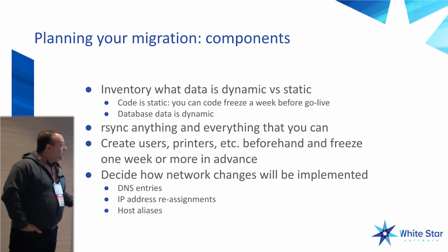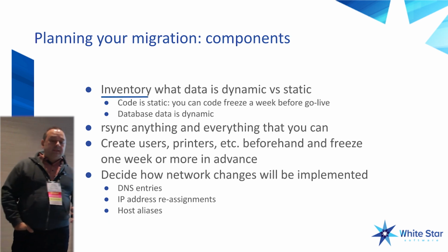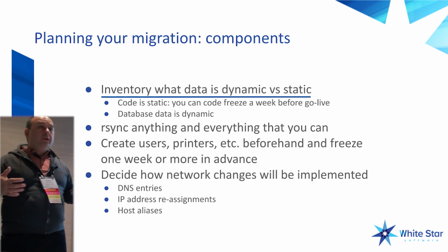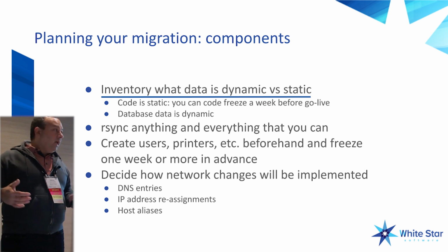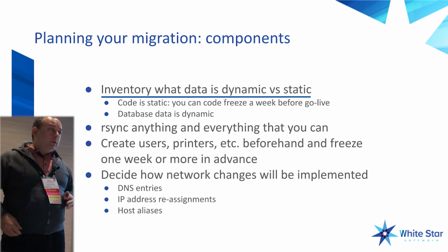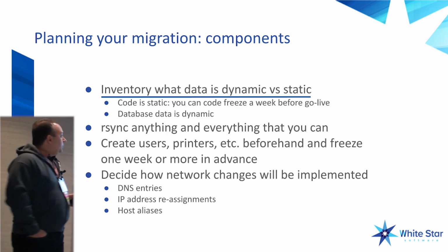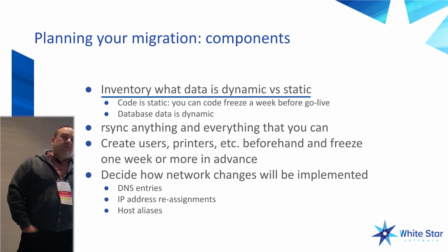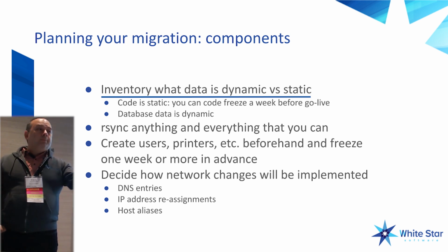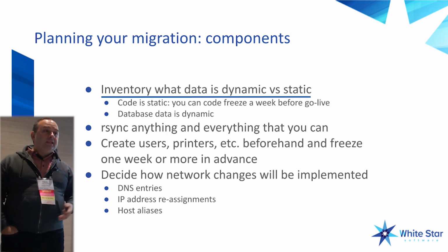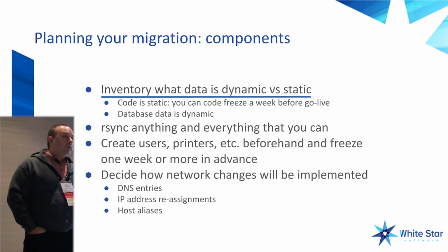And then inventory: what's dynamic data versus static data. So obviously we know the database is going to be dynamic. All right, we have to dump and load the database when we're migrating, but there's a whole bunch of other stuff. There's code, there's flat files, there's all the stuff that's coming in from your customers, all the PDFs that you're generating. All of that stuff needs to be migrated also. So take all of that into account.